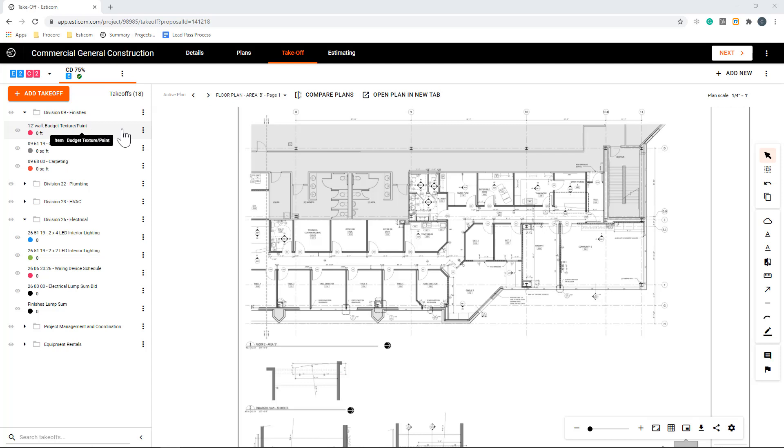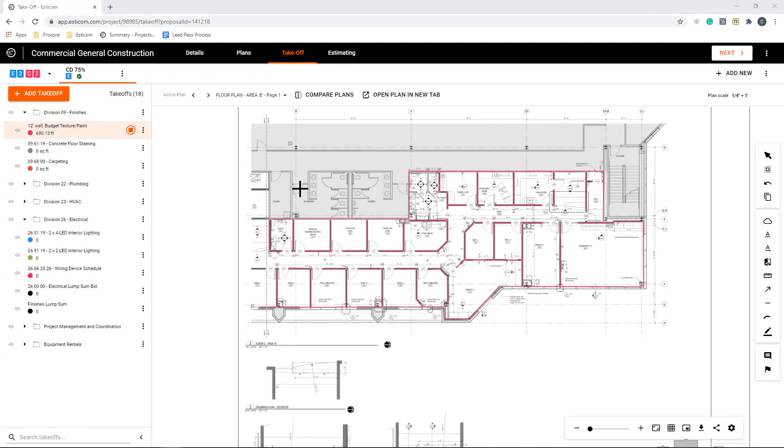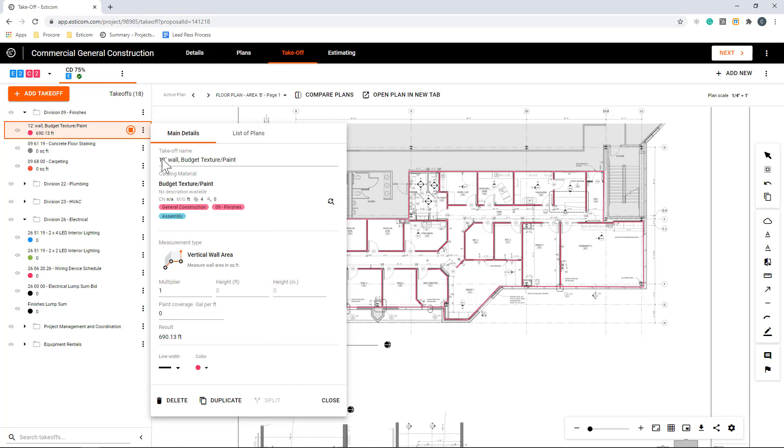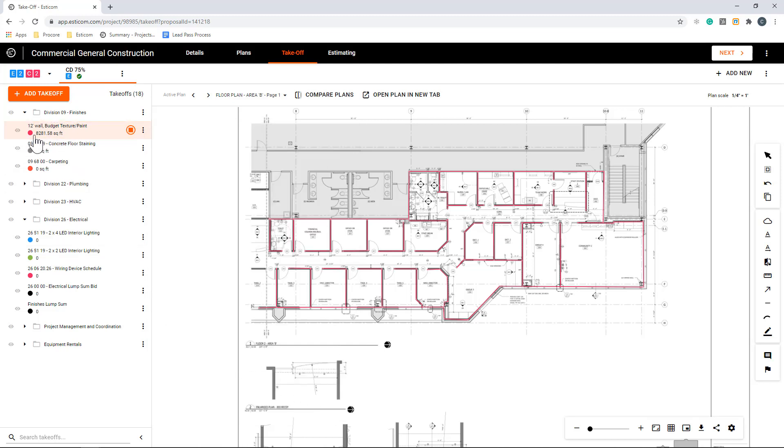Begin by clicking the takeoff name. You'll first notice the mouse cursor turns to a crosshair, and we'll single-click at our starting point to begin our measurement and trace our way along the wall using single-clicks to turn and double-clicks to stop the measurement. You can then single-click to begin measuring again. If you make a mistake, you can always hit the backspace key to back off one segment at a time to make corrections. Now that we've got our linear measurements, let's adjust the height to get the square foot coverage area. In this example, the walls are 12-foot tall, so we'll add 12 feet here, and just like that, we have our coverage area.